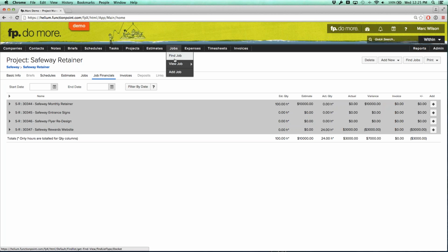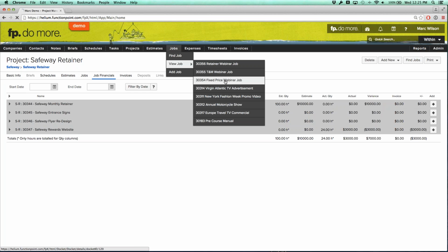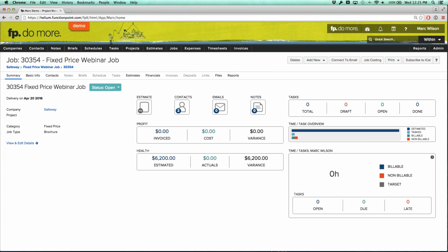Okay, so the first thing that we're going to do is navigate back to that fixed price webinar job. Now, often in a fixed price situation, you're going to bill up a certain portion of it up front. That's usually what I see. Let's say in this situation, it's 50% up front. Again, if you can have the person who opened the job be the one to accomplish this, that's great. If not, what I highly recommend is that you have the system send an alert to the person who needs to do that. So you can go into the alert management and set up an alert for that individual to receive an email anytime a new job is opened. That's going to allow them to know when they need to go in and create a new invoice.